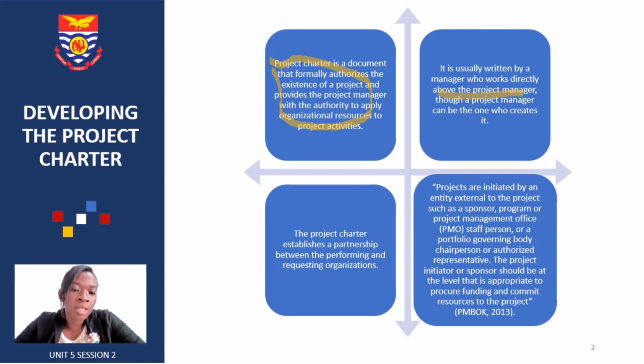It establishes a partnership between the performing and the requesting organizations, where they are meeting each other halfway. Projects are initiated by an entity external to the project, such as a sponsor, program or project management office staff person, or a portfolio governing body chairperson, or authorizing representative. The project initiator or sponsor should be at a level that is appropriate to procure the funds and commit the resources to the project.